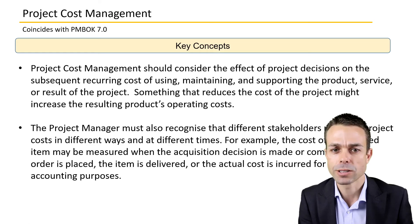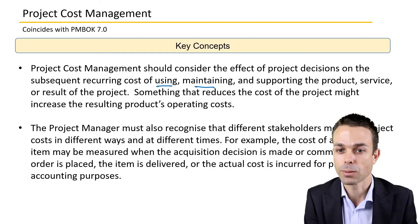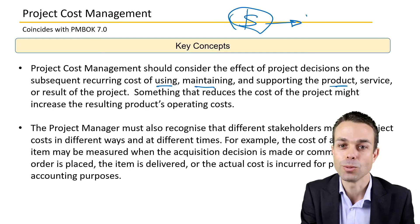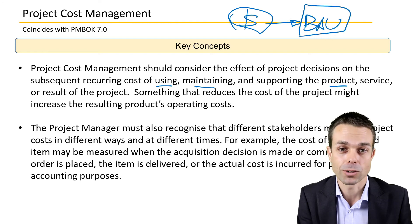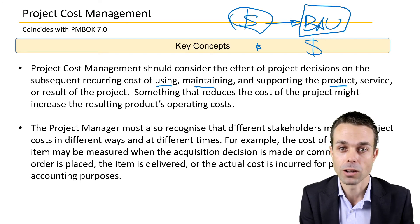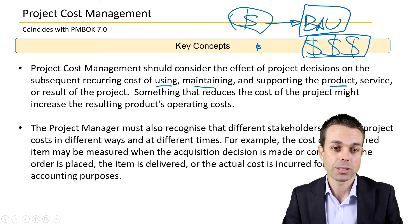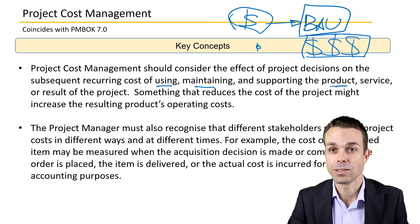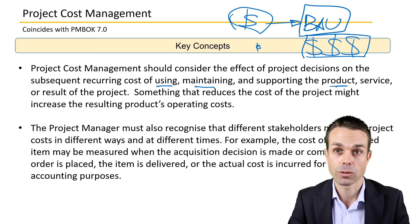Key concepts for project cost management: we should consider the effect of project decisions on the subsequent recurring cost of using, maintaining, and supporting the product, service, or result — how much is it going to cost in business as usual. There's no point delivering something cheaply if it costs a lot to run afterwards; it might just not be worth the money. The project manager must also recognize that different stakeholders measure project costs in different ways, and we have to be open to those different approaches.